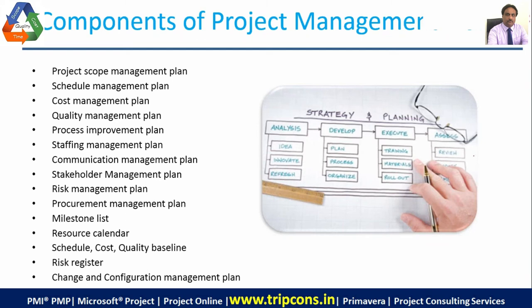Similarly, who makes the baseline for a project? The project manager or the authority? Yes, the project manager and his team of people, those who help in planning the project. You got to do this in the beginning. So how do you do it? You collect the requirements. First, you start with a very clear objective. Then you do a detailed requirement analysis. You document it. Then you get it cross-checked, vetted and signed by the client or the end user, right?